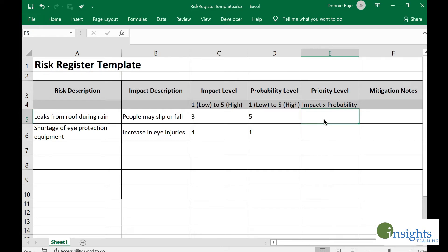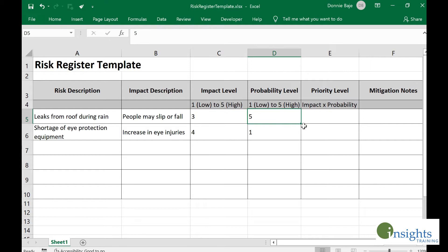In this video, we are going to discuss how to improve a risk register template using some Excel features, tools, or functions. A risk register template can be used to identify a priority number for certain identified risks. This priority number is calculated by multiplying two numbers — the impact number and probability level number — both of which will determine the priority level.